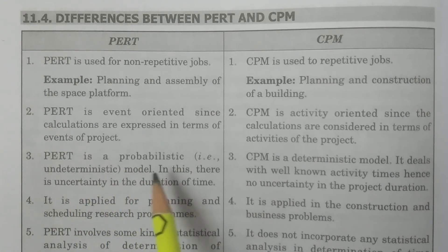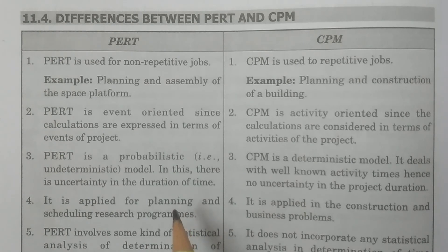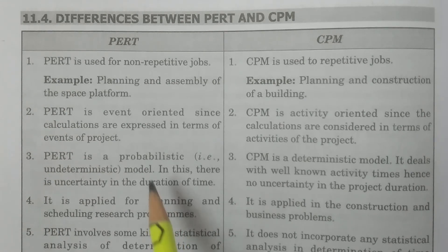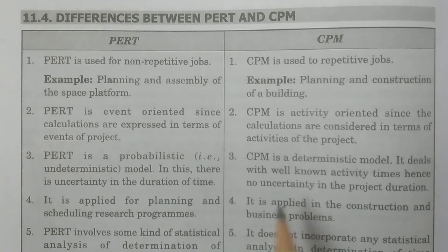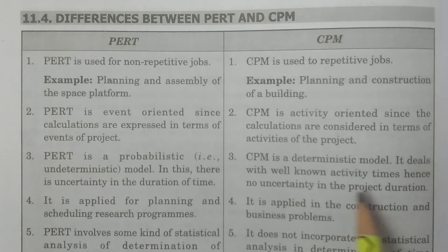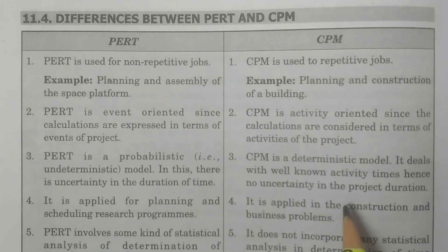Coming to the third point: PERT is a probabilistic, that is undeterministic, kind of model where there is uncertainty in the duration of time — it will not be completed in a specified time. Whereas CPM is a deterministic model; it deals with known activity times, hence there is no uncertainty in the project duration.